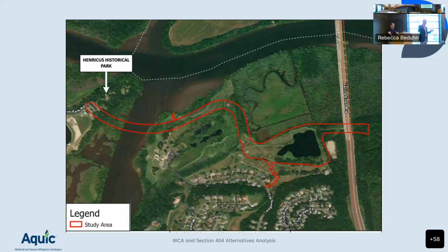But there is an area of potential effect, basically, that we look at, that we determine based on a whole different set of factors to determine how we look at cultural resources. Another one is the Endangered Species Act, a whole different way of identifying how far we look beyond the wetland impact to see if there are effects to endangered species. Unfortunately, we can't go into a lot of detail here today, but I'm really glad you pointed it out. I mentioned all these other laws we have to make sure are complied with before we can issue a permit.